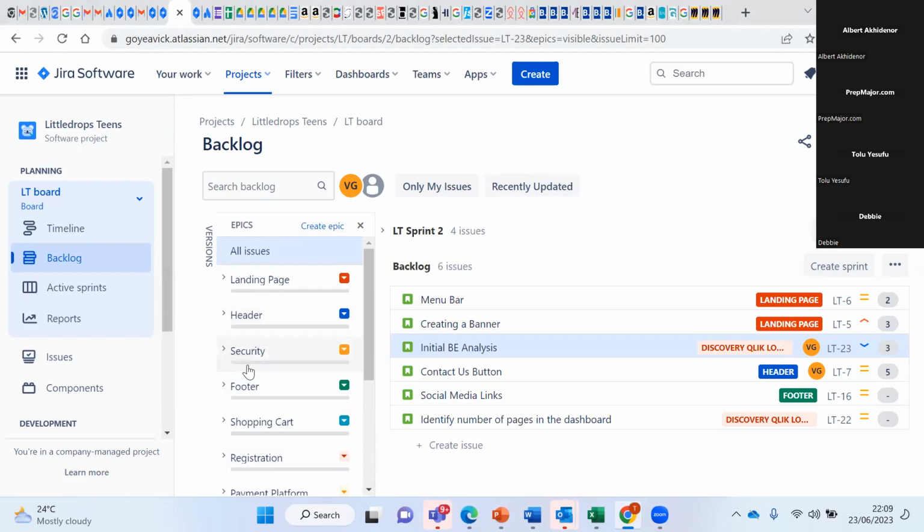So you have a website you want to work on now, and you've been given requirements to say that we want a header. The header must have about us, sign in, log in. You want all of that menu on the header. Then the BA creates an epic and calls that epic maybe landing page or header. And then they will put in a story for each of those different functionalities that has been requested during the requirement elicitation for header. I hope that helps. Yeah, that helps.